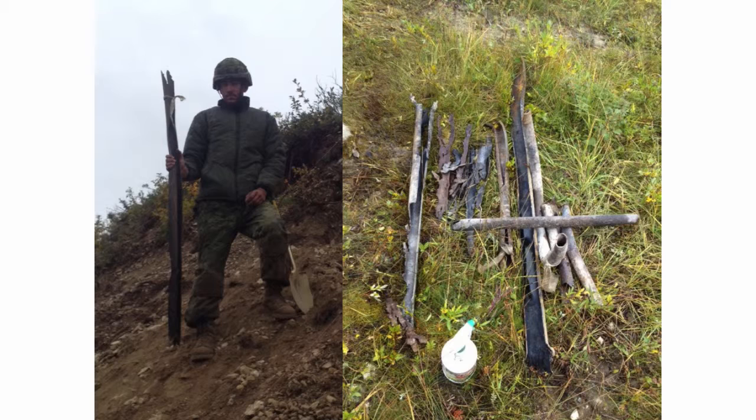Next. So in doing this process, we had a couple interesting results. Several of the pipes, there were 3 pipes that we had just put the cutting charge on the outside, just trying to open up so we could introduce the carrot charge down it. And 2 of those pipes were completely destroyed when we went back to excavate to find the pipe so we could put the carrot down it. So 2 of them were destroyed.